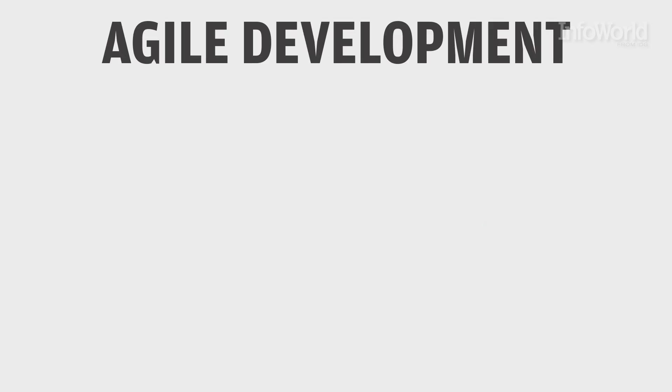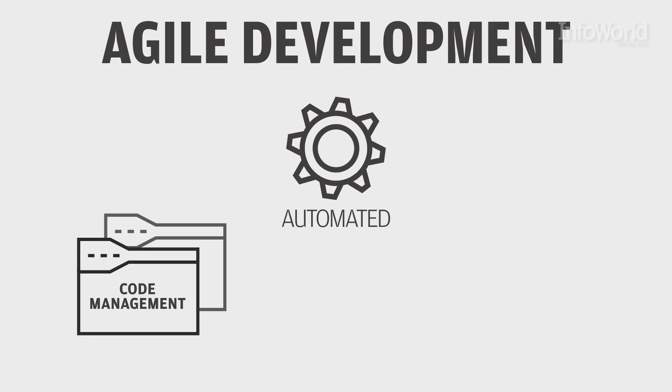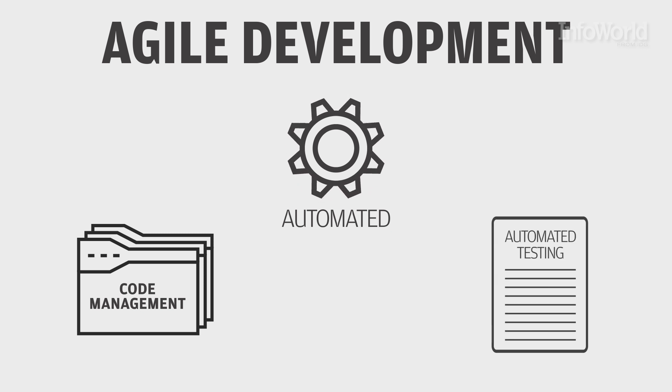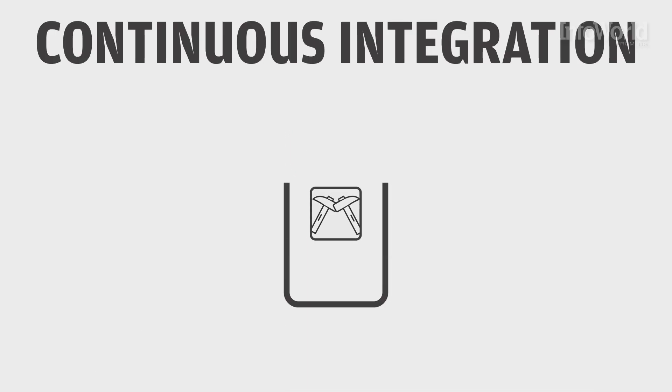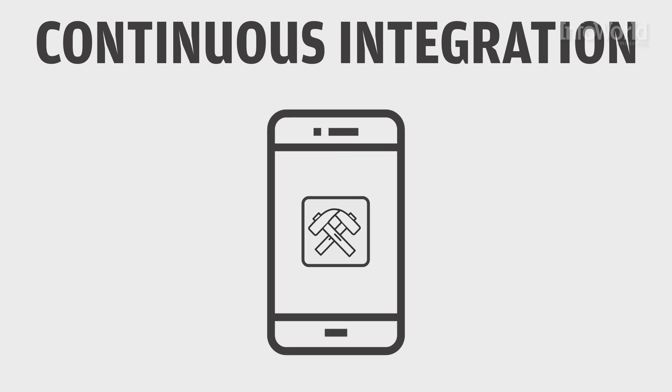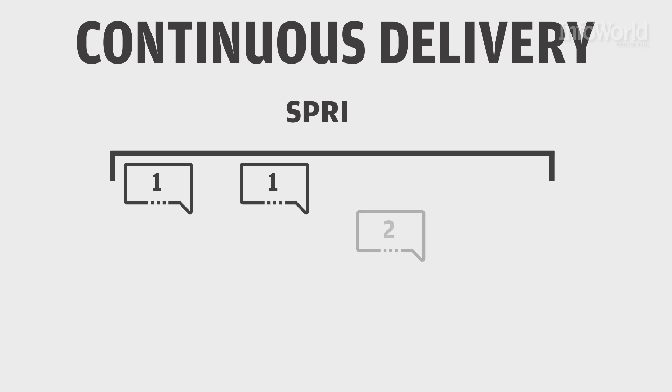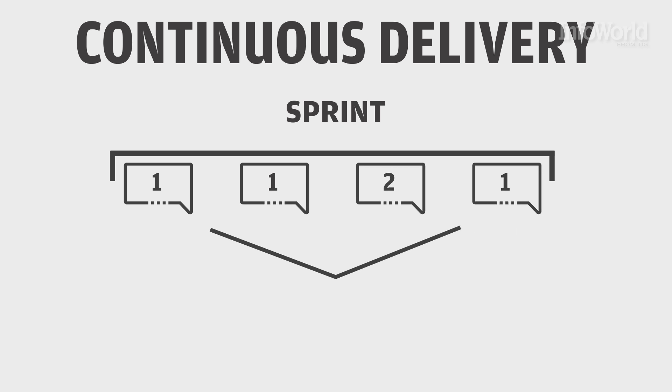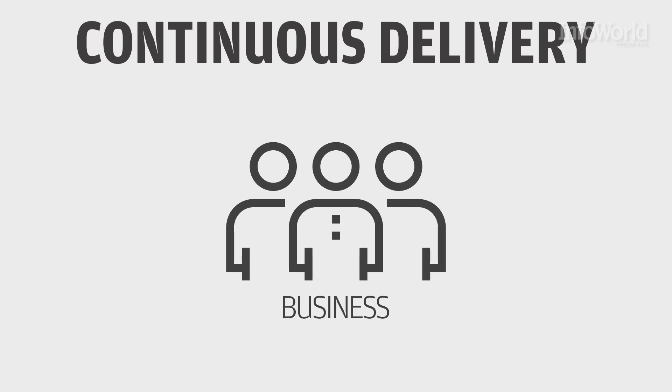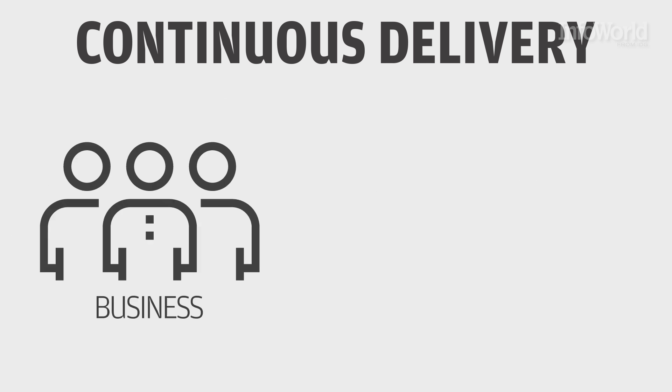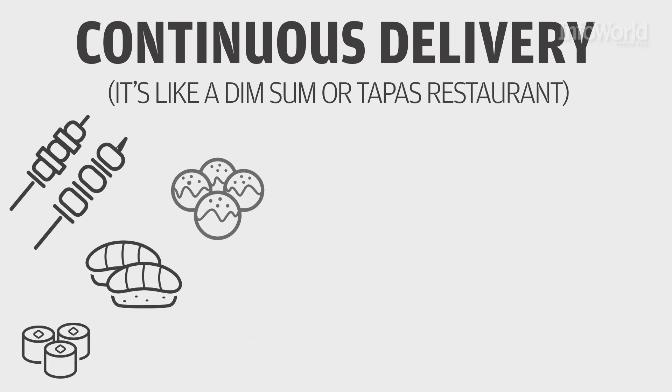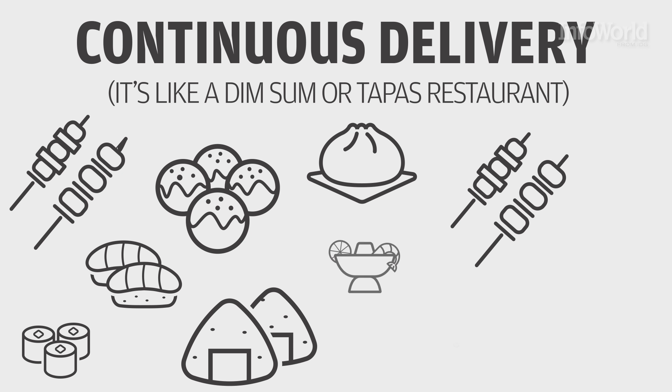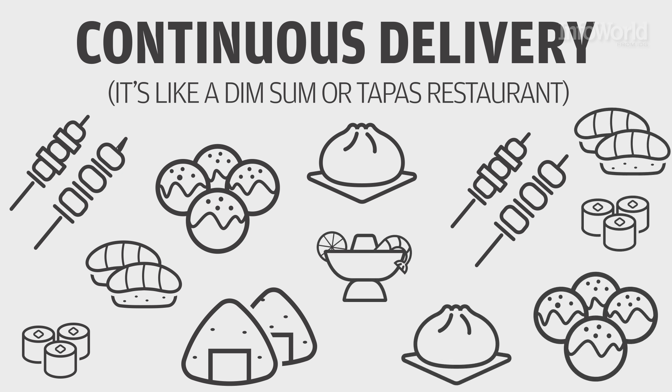In agile development, some of the work can be automated, such as code management and automated testing. Likewise, continuous integration ensures all the ingredients are prepared and then assembled properly to form the item. Continuous delivery lets you deliver code within each sprint, not wait until the end of each sprint. That gets the software to the business faster, though in smaller chunks. It's like a dim sum or tapas restaurant that lets you order different bites of food throughout the meal, delivering each one ready, rather than delivering the whole meal all at once.